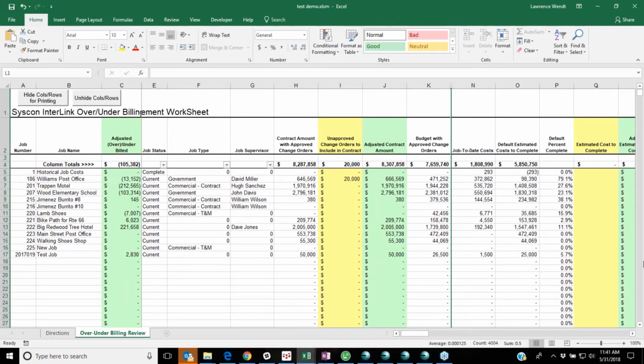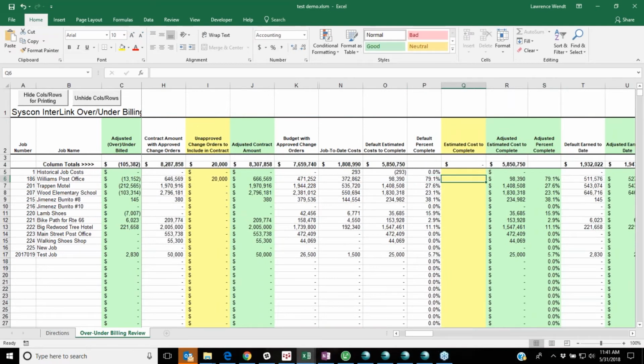And then we get to our cost to complete. So this is a key element, and it's an art unto itself, but you would approach, obviously, your project manager or someone that knows the job well and say, okay, you're about 80% complete with this job according to the cost we've absorbed in the office. And so where are you really? When you go out in the field and you look at where you're at, what is left to do on